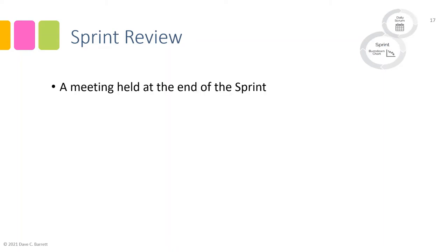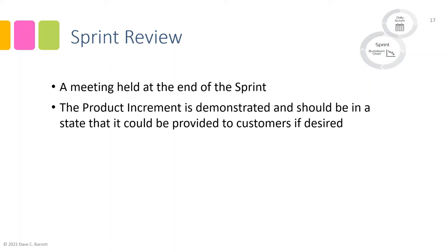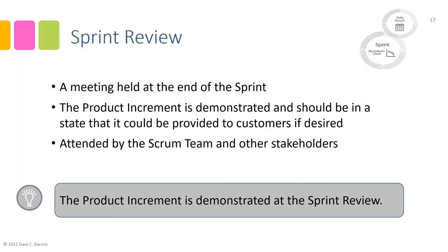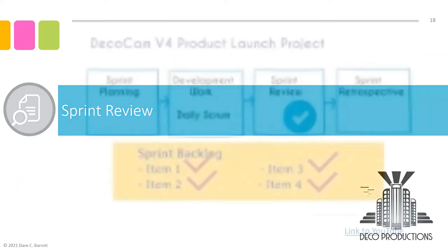The sprint review meeting is held at the end of the sprint — on the last day, a meeting will be held. The product increment — the result of the sprint — is demonstrated and should be in a state that it could be provided to customers if desired. It is attended by the scrum team and other stakeholders as appropriate. Key idea: the product increment is demonstrated at the sprint review, and attendees and other stakeholders may provide feedback to the team, creating a significant information exchange. Let's see the video of the sprint review meeting.